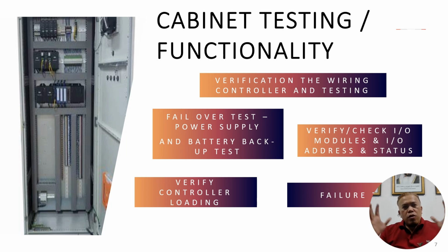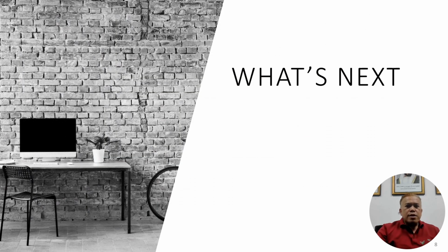This is the whole factory acceptance testing that the contractor offers to the company, the end users, the client, in order that all equipment, all devices, all the controllers and I/O modules are correct and ready to dispatch to our facilities. All right. So what's next?